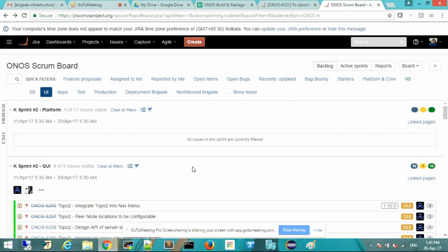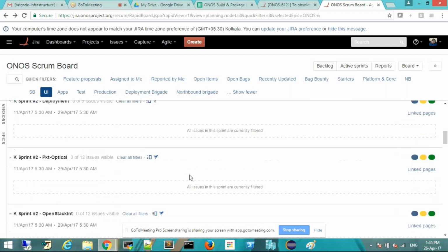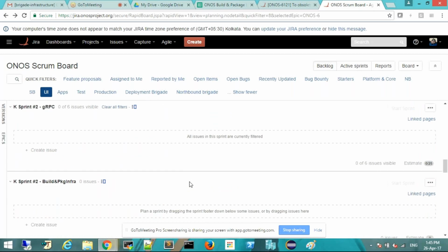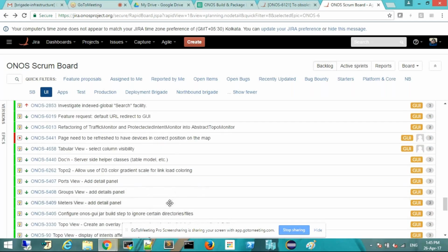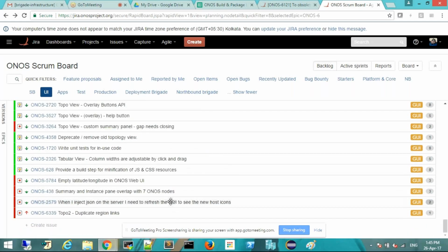So I'll take up this action item to actually refine the user stories and tag them to a responsible and then put them under the sprint board. Okay. So yeah, we'll use Jira as our bug and story tracking tool. We'll figure out the epics. That makes sense. We already have the label defined. We'll get a little button for filtering on that label. Okay. We'll use the standard almost 3-week sprint cadence for planning work.